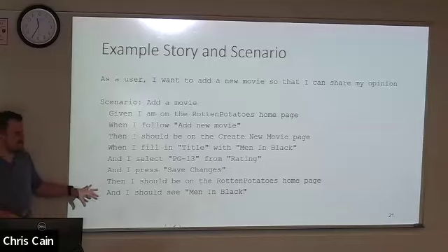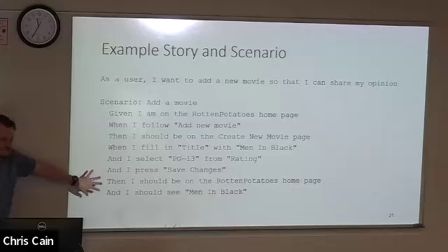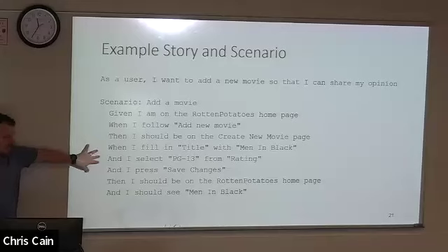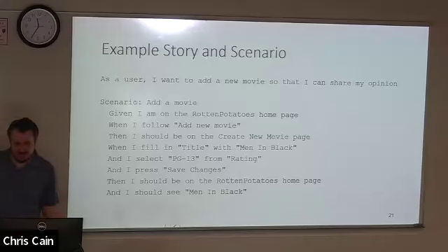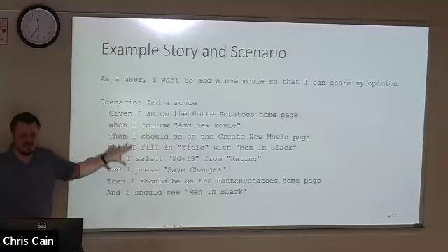Again, nothing technical, but from this to this, and now you can imagine taking this and having a discussion with your team about how we are actually going to accomplish this. What technology should we use? What should the page layout look like? We can start to have those kinds of conversations to define the actual technical tasks that need to be done, based off of a long list of scenarios that were built from your user stories. So user story, the scenario, the tasks.